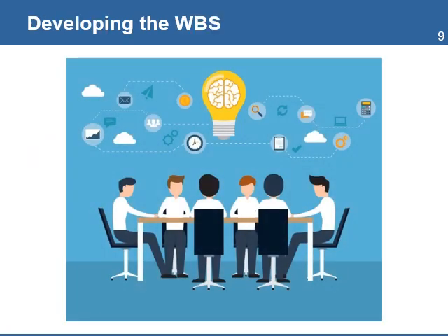Developing the WBS is a participative process. You will need to include team members, some key stakeholders, and people in the organization that have worked in a similar project. The information you will need includes the project proposal and the logical framework matrix. To develop a WBS, you will need to organize a meeting and distribute all relevant information to the participants. A participative process ensures the WBS will be complete and helps key stakeholders understand the scope of the project.